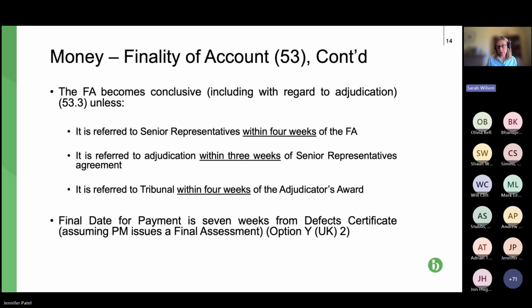A big adjudication in terms of issues or a large value adjudication. So I just think contractors, subcontractors, you need to be diarising, as I say, kind of two-thirds into your defects period, maybe three-quarters, just to think, right, where is this going? Do we need to start preparing, or at least getting some legal advice, or possibly reaching an agreement to extend these periods?